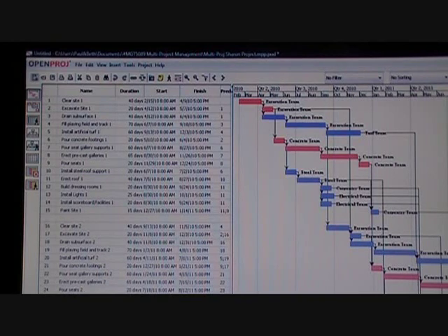Okay, the fourth part of this tutorial on the subject of OpenProject will discuss strictly slack time and task crashing. Slack time being the amount of movement that we have available to us on the non-critical path that we can move tasks around in order to do resource leveling, and task crashing being obviously on the critical path such that a reduction in time or expediting that task would bring the end date in.